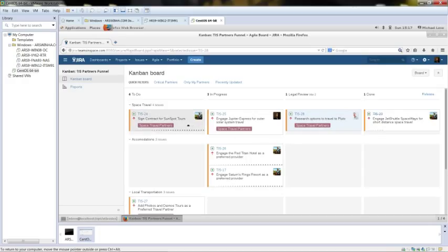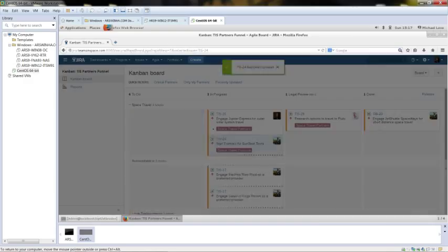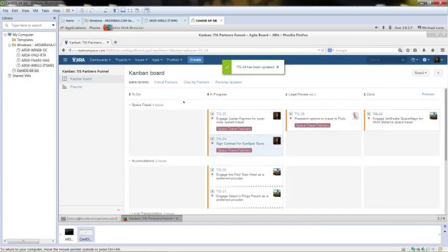So Jira not only shows the number of issues in red when the amount of issues being worked on at one time is exceeded. We can configure this by configuring the board. We can configure columns. And here you can see there's a minimum value and a maximum value. The maximum value will be the constraint as to how many issues can be in progress at one time. So as you can see for legal review, there's a maximum of 2.